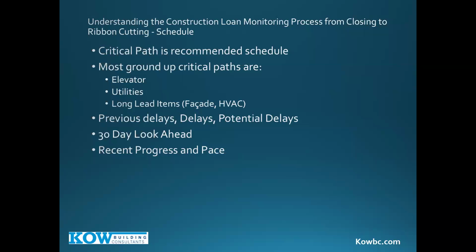Your bathroom would have a 4-week float because that's the difference between the bathroom schedule and your kitchen, which is your critical path. However, if your kitchen company calls and says, hey, bad news, that specialty sink you wanted is going to delay me a week, you're now delayed. You're now not getting in 8 weeks, it's 9 weeks. So your critical path is your longest period of time in sequence to get to completion.